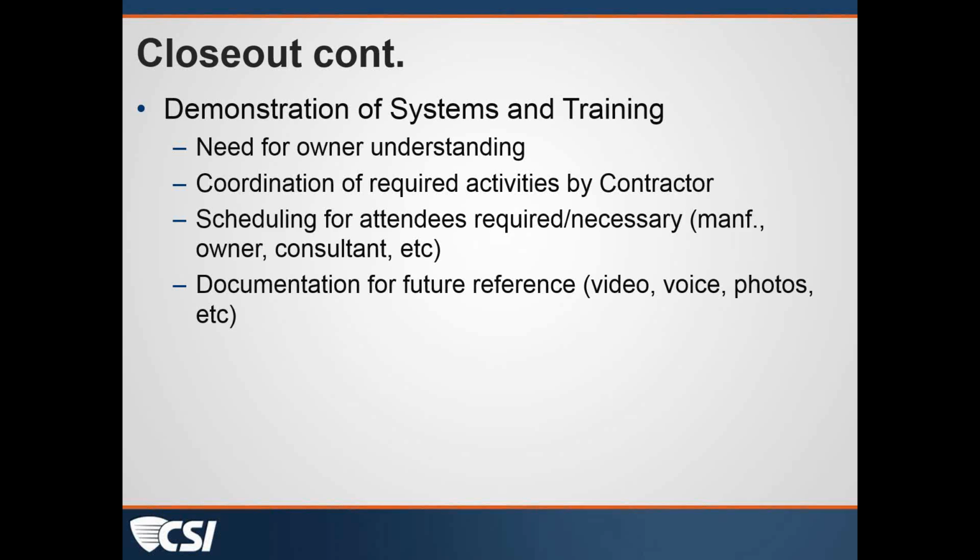And then going off of that, Michelle Boom indicated that she's worked with both GCs and subs. In both cases, final payments have been held for record drawings and closeout docs. We've also required submittals prior to first payment being issued.